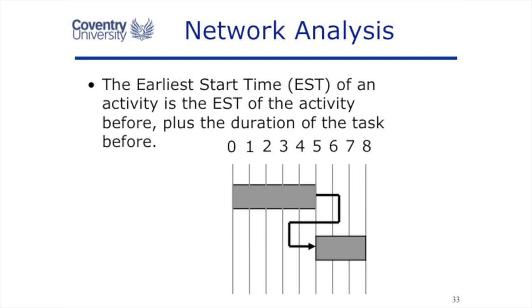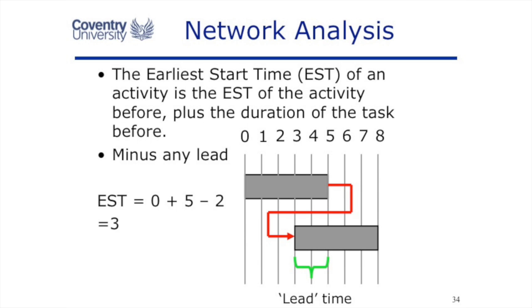What we're going to be doing is something called the forwards pass or the forwards schedule. We're going to work our way forwards through the project, calculating the earliest possible starting time for each of the tasks, the EST, the early starting time. Basically, the early starting time of any activity is the early starting time of the activity before it plus the duration of the task before it. It's common sense.